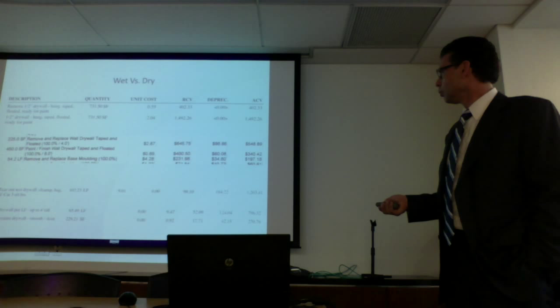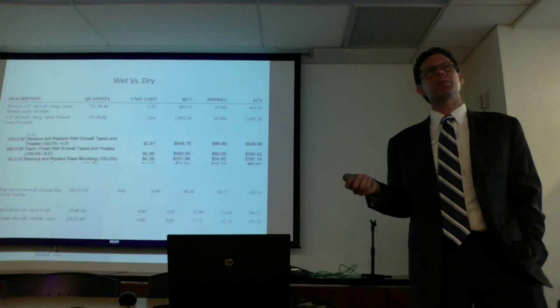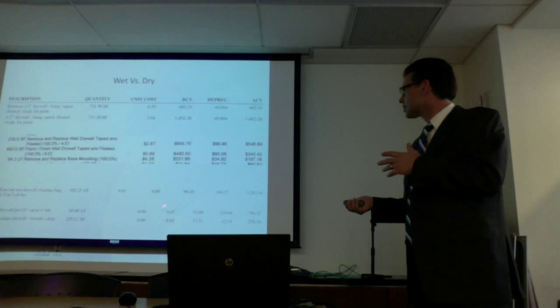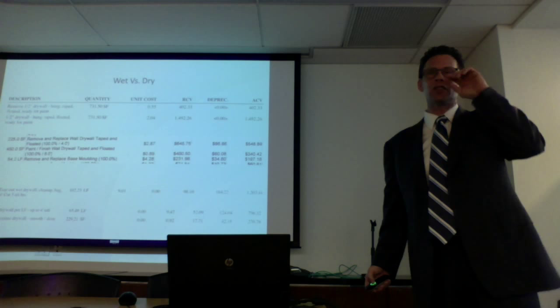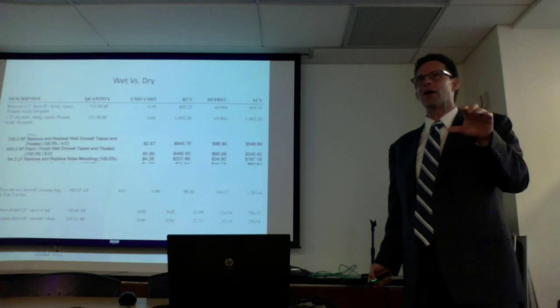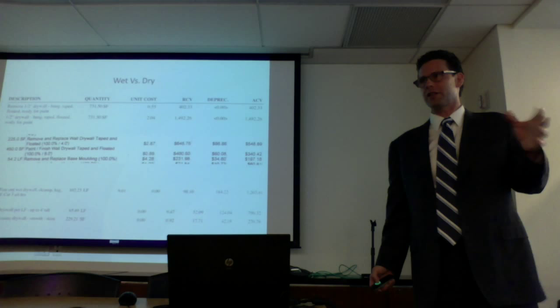And what that is, keep in mind, the drywall number, and there's one other factor that's assumed in this price. This price in Xactimate assumes, and if you look at the description, it says, it assumes that the contractor has the drywall as an in-stock or in-house item. I don't know a contractor that stocks pallets of drywall in his garage, his house, or his storage unit.